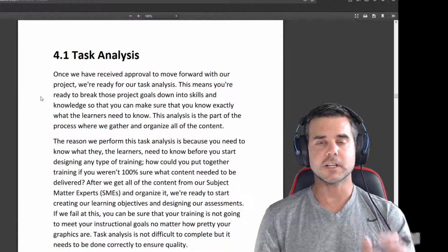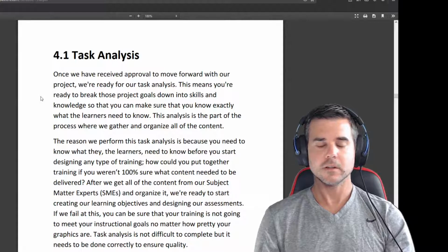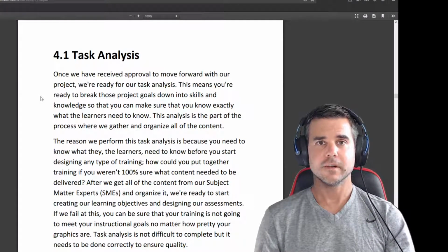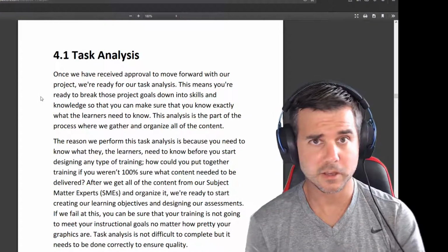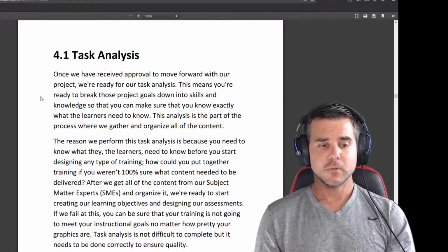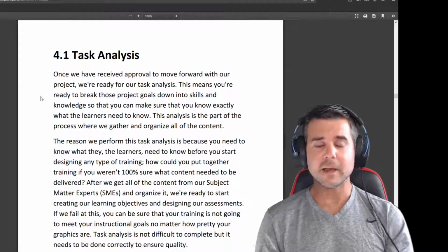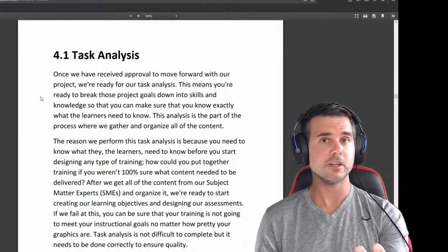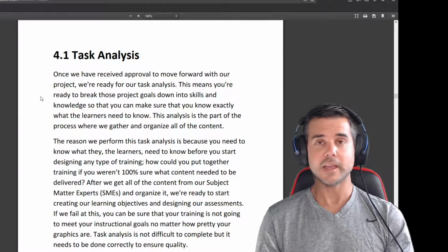What that means is if a client comes to me and tells me they need a 1 hour long training, they're not telling you the correct thing. They probably need like a 3 hour training. Now, if it's like a government mandate where it has to be 1 hour, okay, it's going to be 1 hour. But if I ask, how long do you think it's going to take to get through the training? And they say, oh, about an hour, that probably means 2 to 3 hours. So assume that. Always over budget like that.